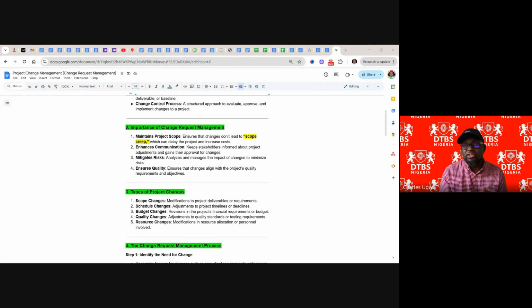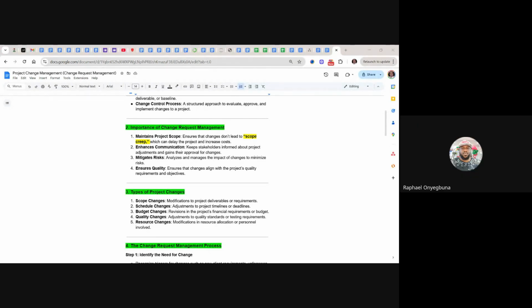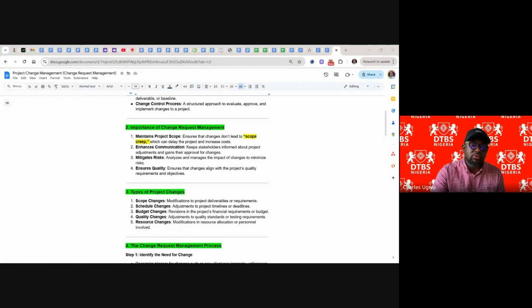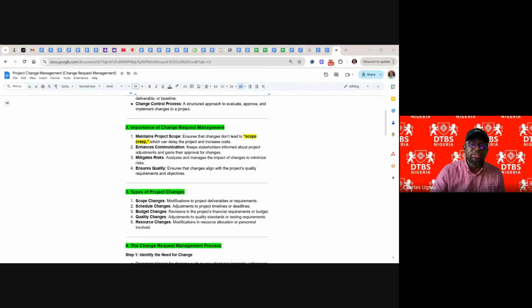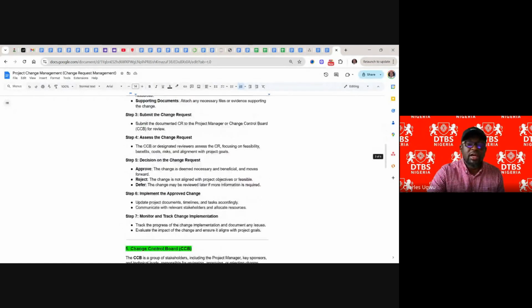Your budget has changed, so you still need to capture it. But the key term while you are capturing it is going to be unforeseen circumstance, exceptional circumstance, which is inflation. So if you look at this here, you have a title, the reason. You give it as a reason why there is this change. You must give a reason.